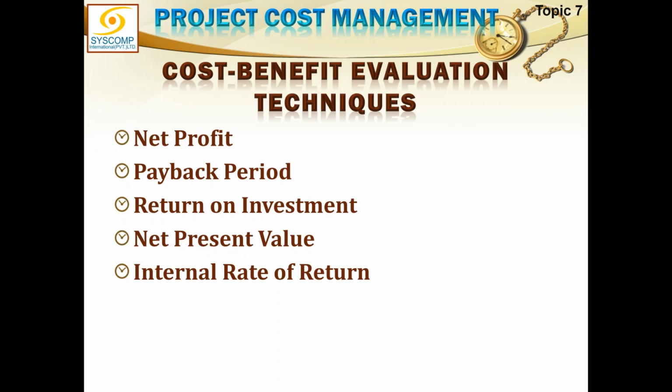Average annual profit means the total profit in 5 years averaged out for 1 year. Understand? The total profit for so many years averaged for 1 year is the average annual profit. It's not about months. It's about the total benefit divided by the total number of years.